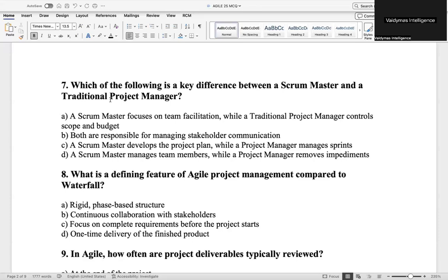So HMOs are supposed to send some files to us, and we too were supposed to extract some file and send out. What now happened is that we've been sending, but unfortunately, the dates the HMOs are sending to us end in October, whereas we need those dates to be extended further. But that was originally not part of the project. Out of good faith, we decided to take it on as an additional, that's a scope creep. We call it scope creep once you are taking more than what the original scope defines.